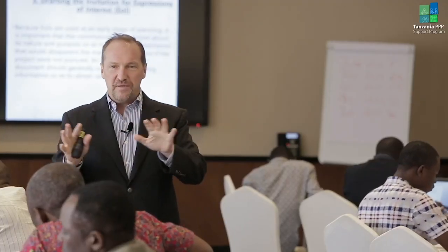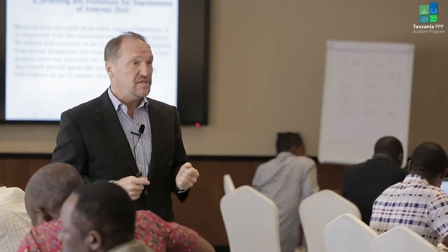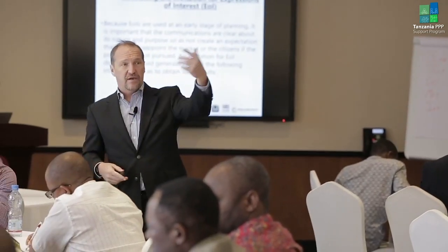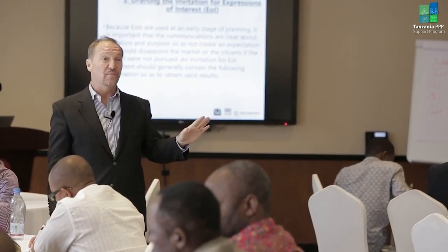For some reason, maybe they believe it's too high risk. Maybe they just don't know about PPPs. Maybe there's something we need to fix. But better to find that out now, early on, rather than wait until we release an RFP and maybe we only get 1 bid or no bids.